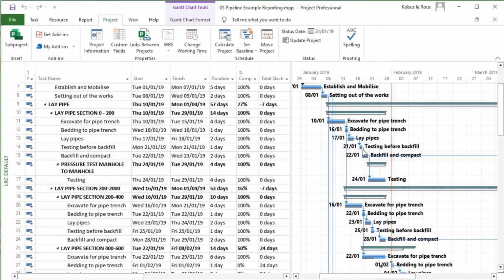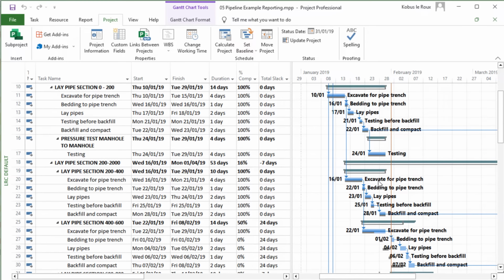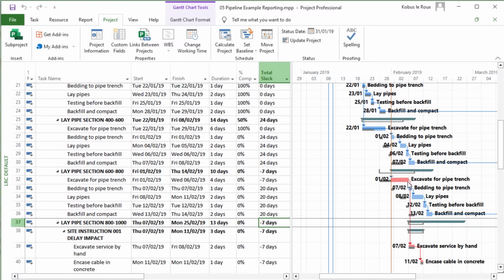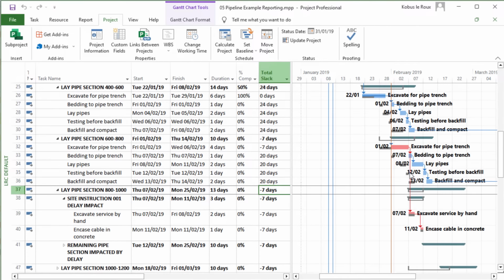So if I look at this particular schedule, you'll see everything here on the left-hand side of the time now line, they should have completed. So in other words, they've got completion dates on the left-hand side of time now, meaning they should have completed. They should be 100% complete at this point. Then everything on the right-hand side, in terms of start dates, is something that should not have started. And this is my second category. So I want to understand which of these tasks should not have started based on, again, their baseline dates and where we are now in time.